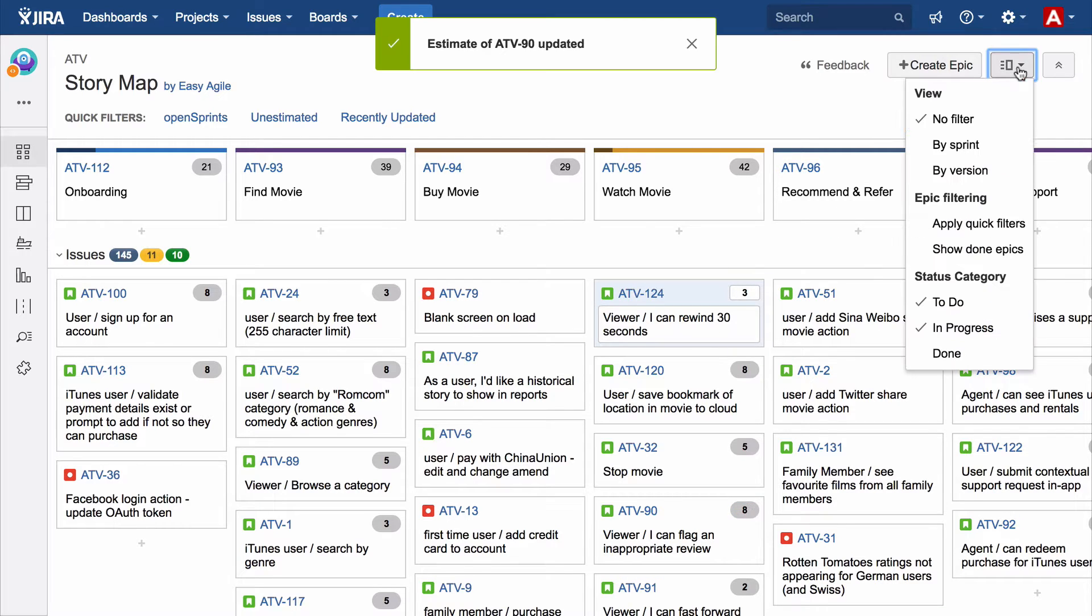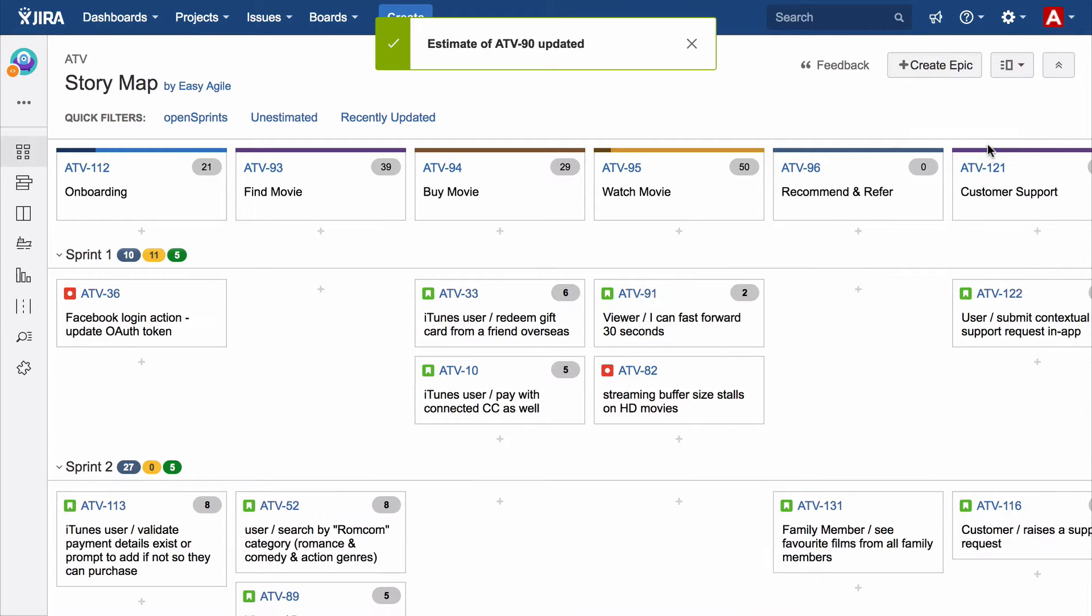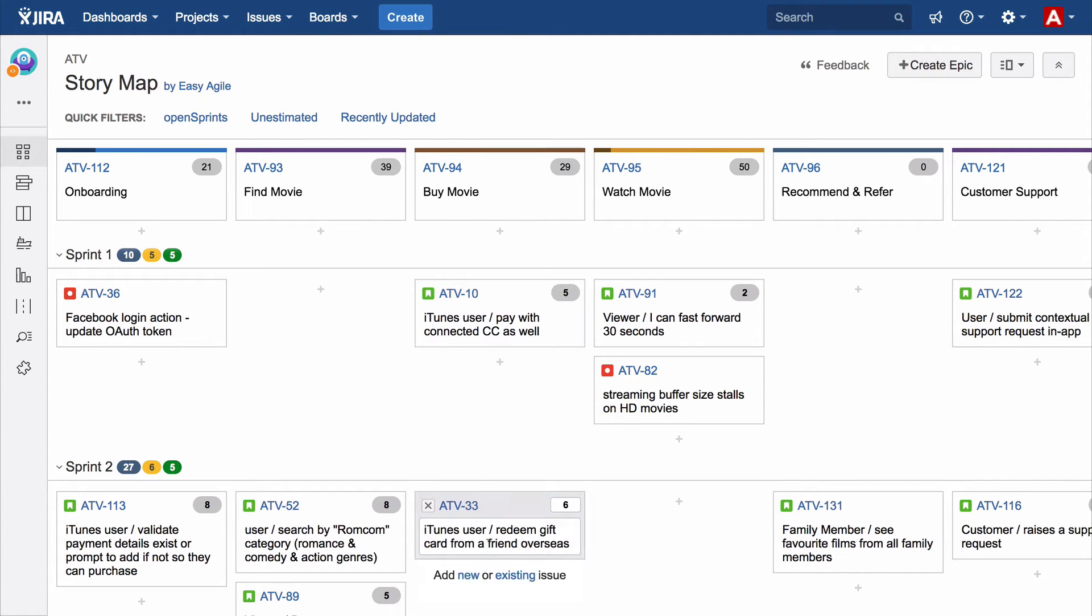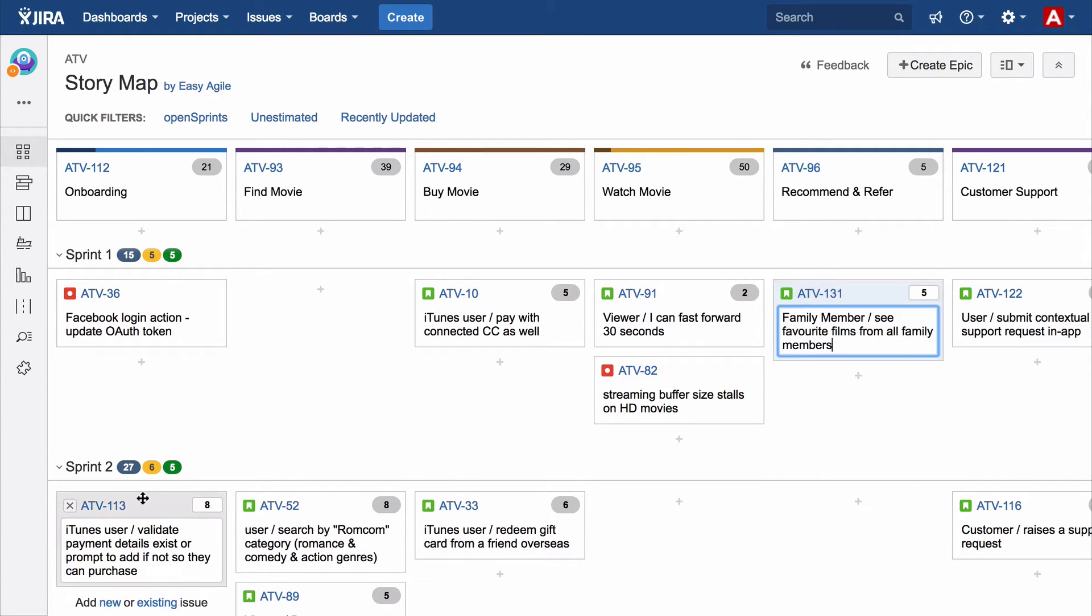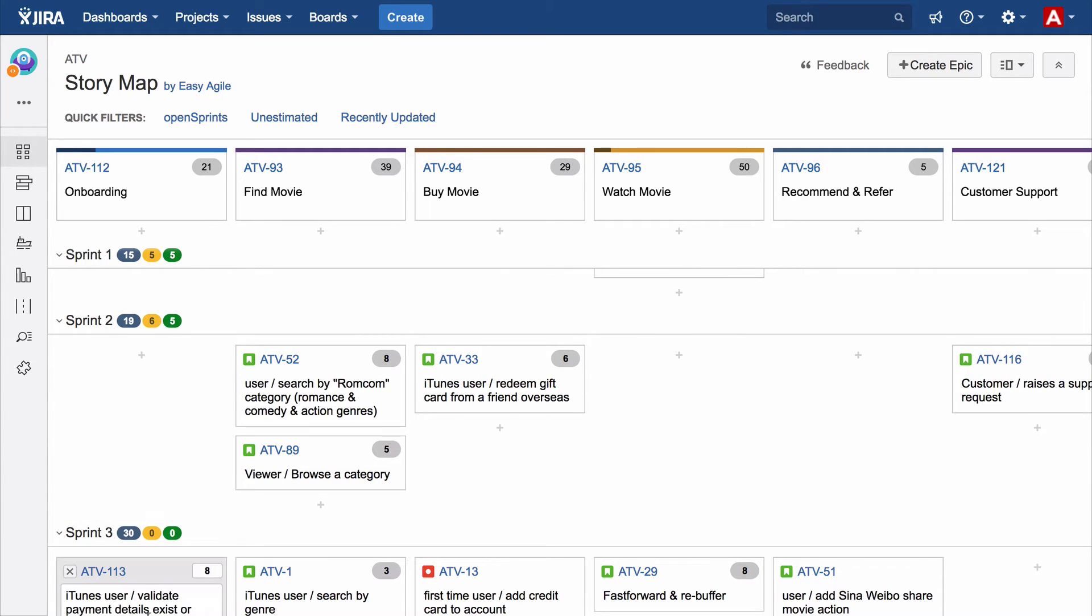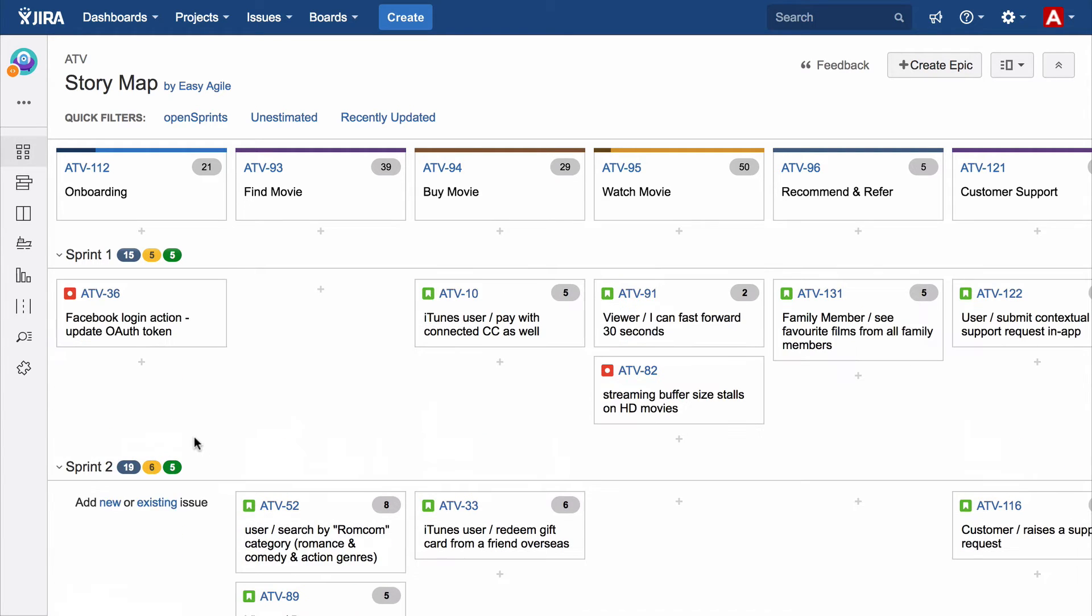Filter the story map by sprint or version and drag and drop stories to sequence work. With the epic and sprint statistics, you can see the team's workload from sprint to sprint and how you've chosen to allocate time between various epics.